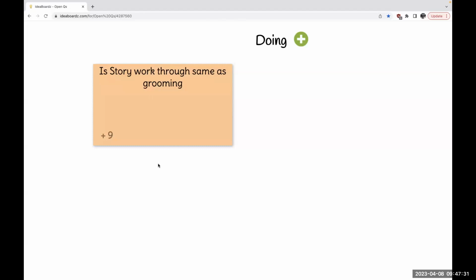And I want you to think about it. Developers are usually 2 to 1. So if you have 4 developers, you get 2 testers and you have a PO. So think about it this way. To me, a perfect team is 1 Scrum Master, 1 PO, 5 developers, 2 testers or 3 testers. One of the testers is 2 manual testing and 1 is automation tester, or 2 automation testers at the end.